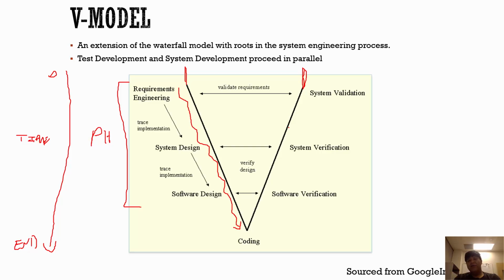So hopefully I'm not going to get squeezed and say, okay, this is the end of the project, I need to get all my testing in from scratch. No, the idea is we've done some stuff up front in order to make our lives easier for when we get something that we can actually run, and then execute those tests that we've already developed, and hopefully things go well for us. So that's the idea of a V model. Basically, it's waterfall with some additional space in there for making sure that we have appropriate time to design and plan our test process for this piece of software.